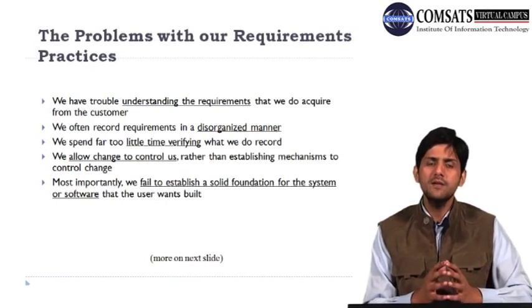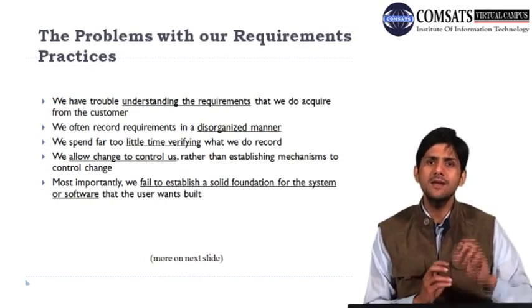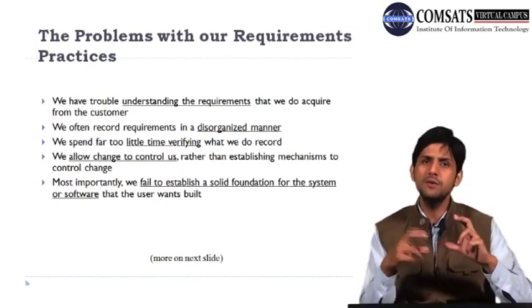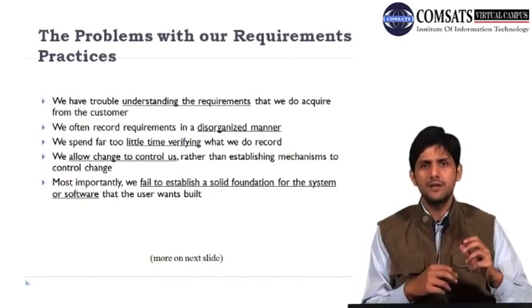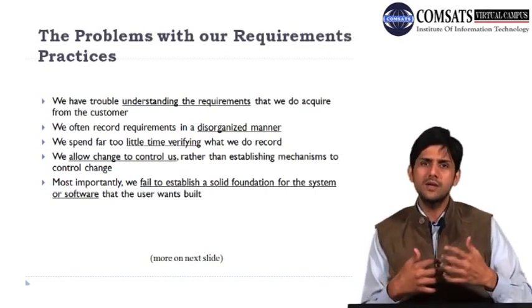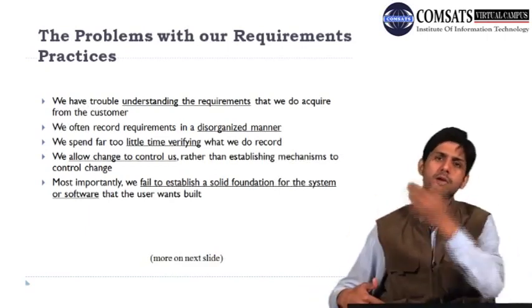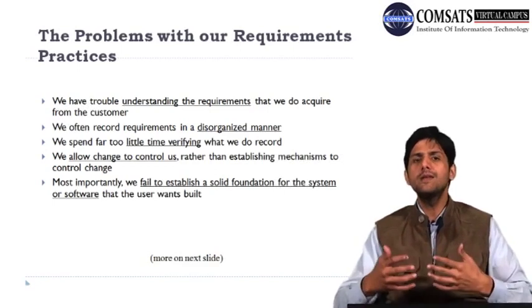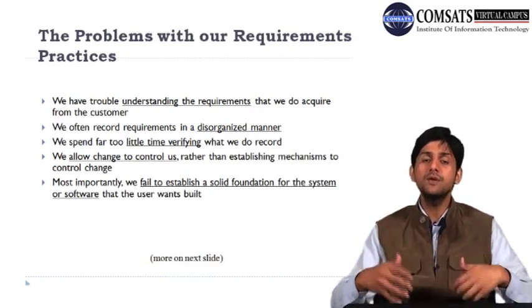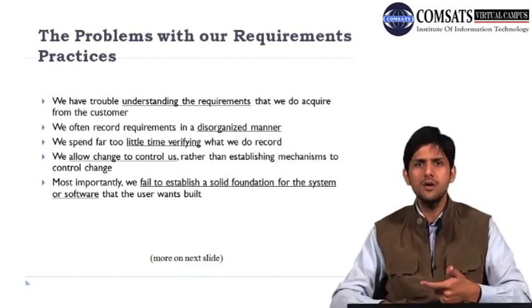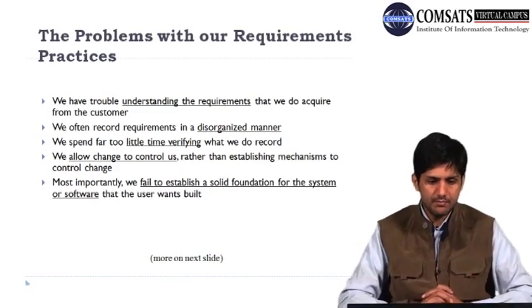The benefit would be that if there are any conflicts or inconsistencies in those requirements, you would be able to identify them. But if your requirement document expresses some student requirement, then moves to administration, then faculty, and then jumps back to students, it will not be very readable. That is one of the problems: we record requirements in a disorganized manner.